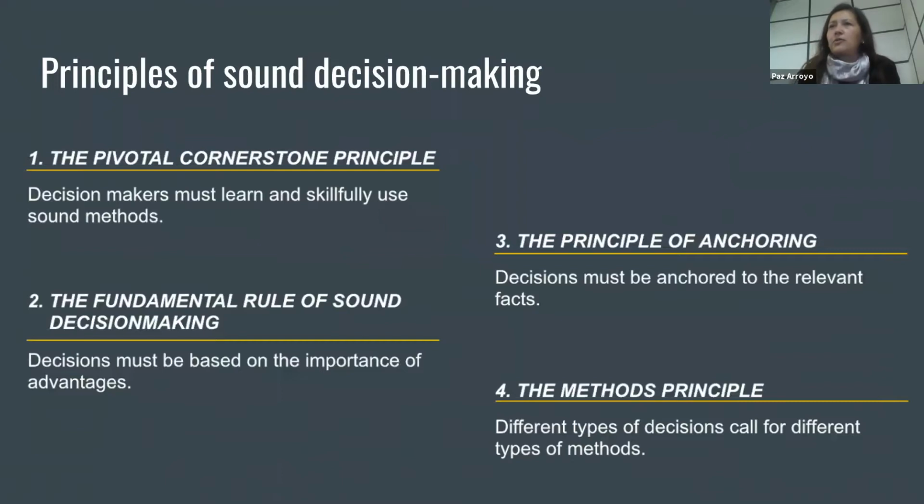What if the result of 2 alternatives is the same advantage? Okay, so there are attributes, right? If the attribute is the same for all the alternatives, there's no advantage. And therefore you don't consider that because it doesn't differentiate between the alternatives. If you have more than 2 alternatives, say 3 alternatives, and 2 have the same advantage, then you will consider the 2 of them as the same importance. Okay.